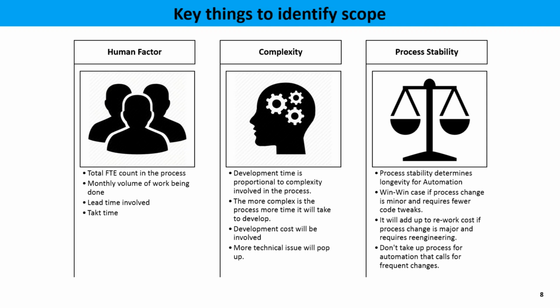If it is a simpler process, then the development time will be lower. So development time is proportional to the complexity involved in the process. The more complex the process, the more time it takes to develop, more development cost will be involved, and more technical issues might come up. You have to think about this perspective as well.